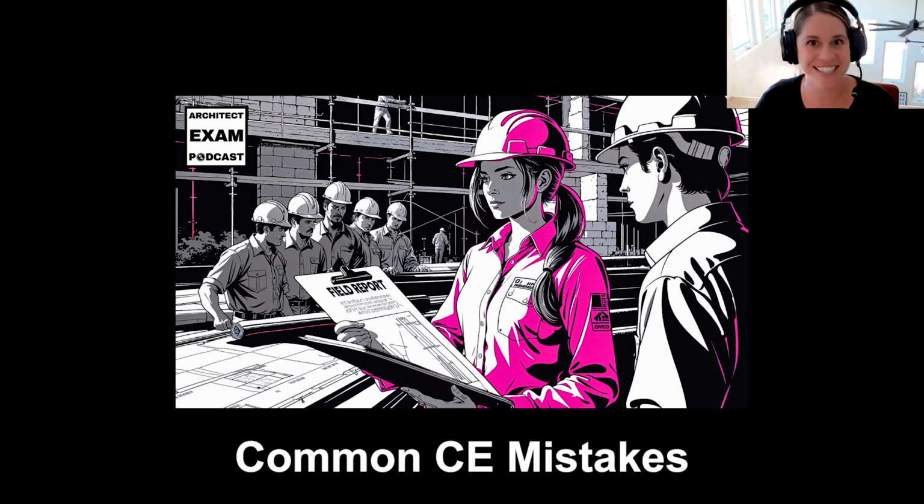I have a lot of stories about site visits and things that got weird very quickly. I've even been hired, I wasn't necessarily the architect of a project, but was hired later after the fact when a roof installation was failing. They essentially hired me to weigh in and take a look at what was going wrong. I asked for copies of their field reports and photos that were taken during construction. And by going through those documents, which architects and contractors should all keep records of, I saw that there was inclement weather while the roof was being installed and that it was raining.